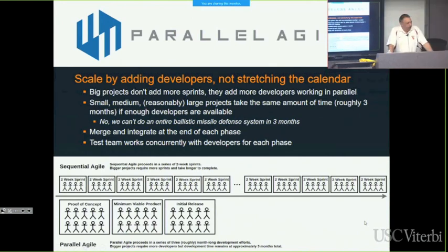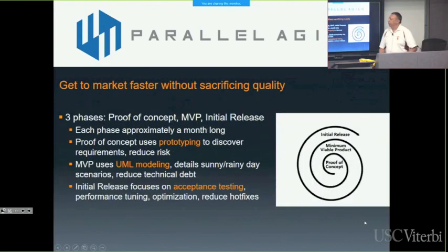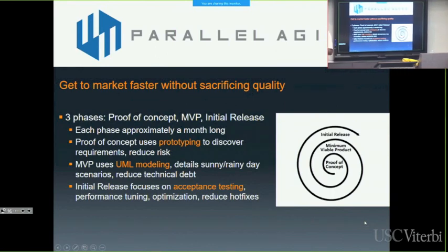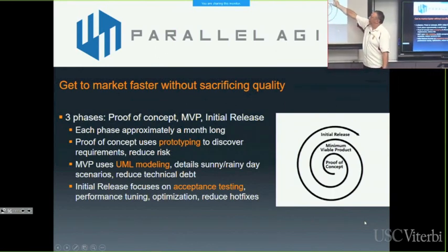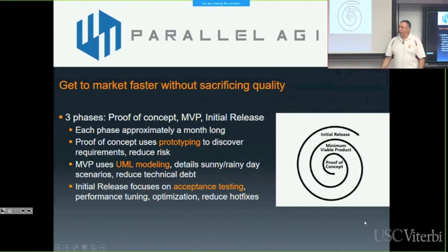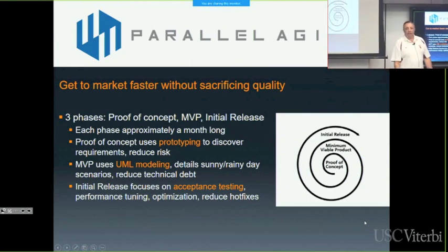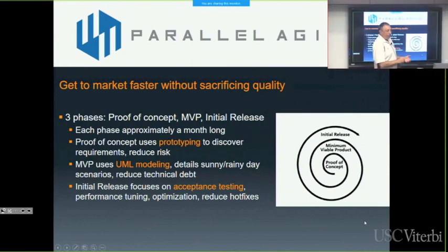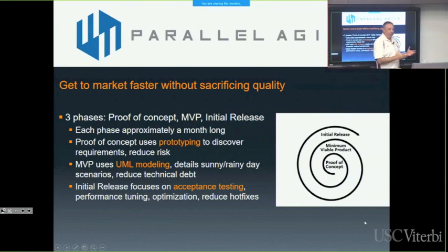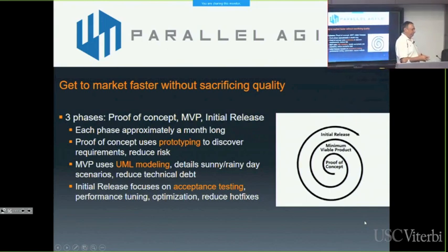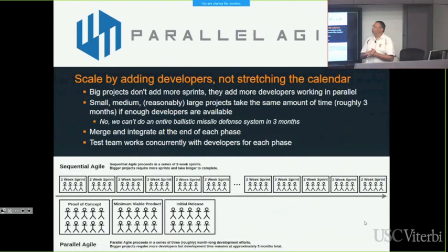It means you can take on small, medium, and pretty decent-sized projects in around 3 months, because we take each of these phases, since everybody's got their own use case and everybody can do their use case in a month or less. You get a month here, a month there, a month there, and in 3 months you go from nothing to a system that's been prototyped, designed, acceptance tested, optimized, and ready to ship, okay? That's kind of cool.